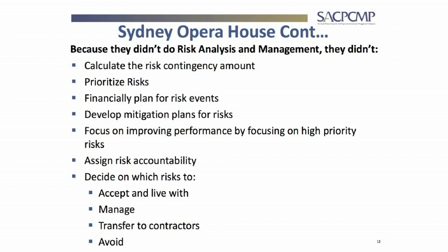So if it's capped at the contract value, of which it's usually 10%, for example, but a month in overrunning capitalization, they might lose more in revenue than what they could on a performance or a retention guarantee. So they can pull the performance bond, whatever retention they have, but still in commercials, it's capped at a certain value. And that's also what we usually do from a risk point of view, is look at what is the exposure. Did the client and the contractor, how did they protect themselves in a contract environment? Because that's very true. There are certain things that they have at their disposal, but it's also only to a certain extent, and in what contract it is, whether it's FIDIC, NEC.